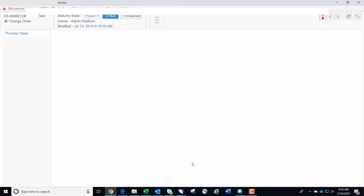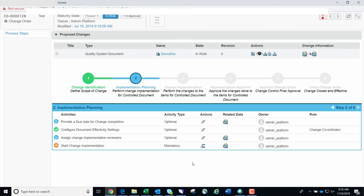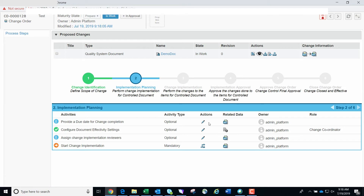We are now in step two of the CO process steps. Here we have the option to provide a due date for change completion and assign change implementation reviewers. Since these are optional, we will move to the next mandatory step and start implementation approval for the CO by clicking the promote icon in the actions menu again.